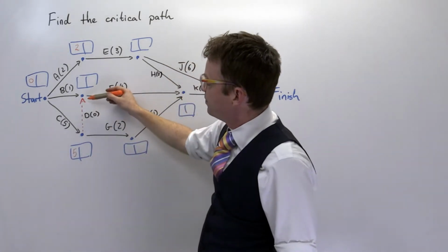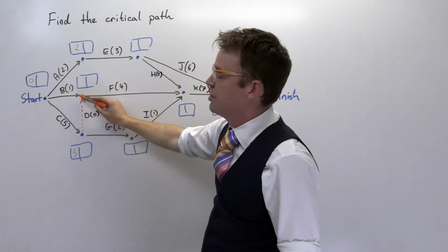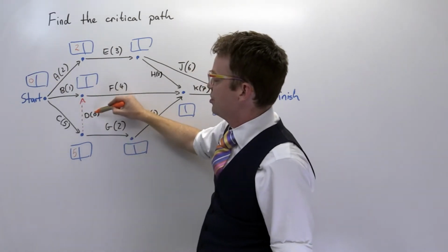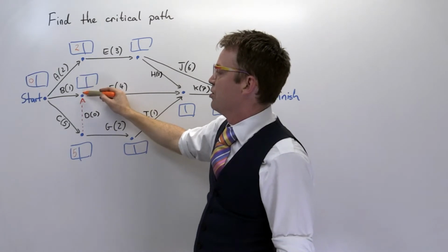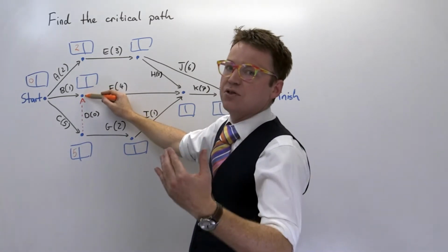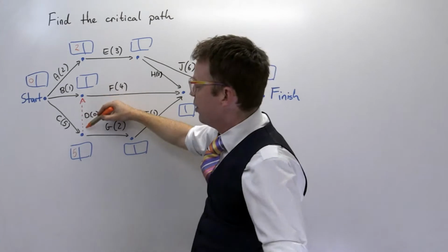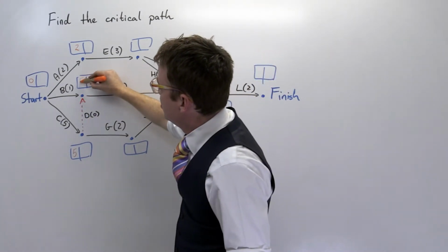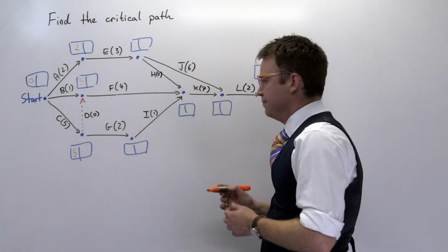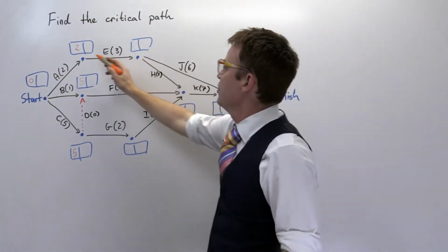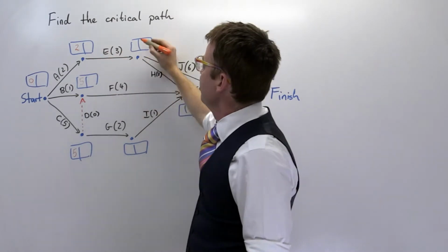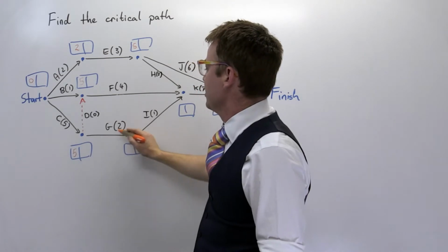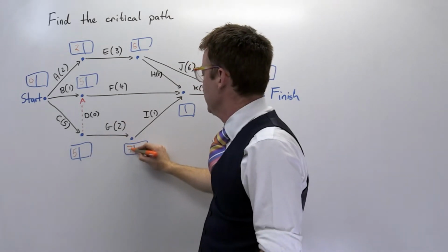Now we can come back here. We know how long it takes to achieve this edge, that's just 0 plus 1, and we know how long it takes to achieve this edge, just 0 plus 5, and in order to achieve this edge, the earliest you can possibly do it is at time 5. You need both of these things to be achieved, and so you just take the maximum there and put a 5 down. Good, then you just proceed through. This one here can be achieved at time 5. This one here, there's one thing incoming, so it's just 7.